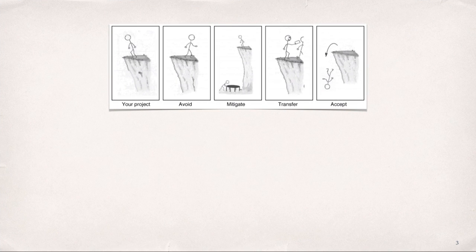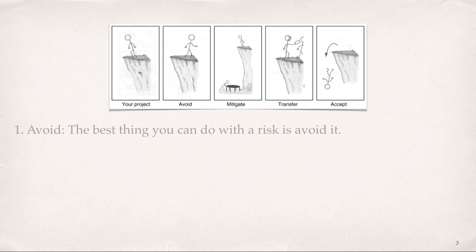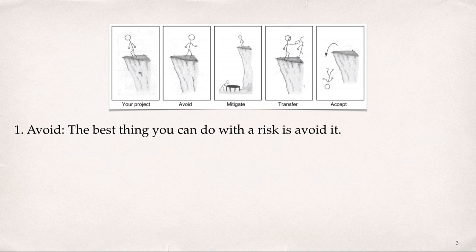We begin with a humorous look at risk management from the view of the project manager. In the assigned reading for this module, Watt uses the metaphor of a project manager standing on a cliff at the start of the project with the risk of falling off. In this example, there are four ways to handle a risk. The first is to avoid it. The best thing you can do with a risk is to avoid it. If you can prevent it from happening, it definitely won't hurt your project. The easiest way to avoid this risk is to walk away from the cliff, but that may not be an option on this project.